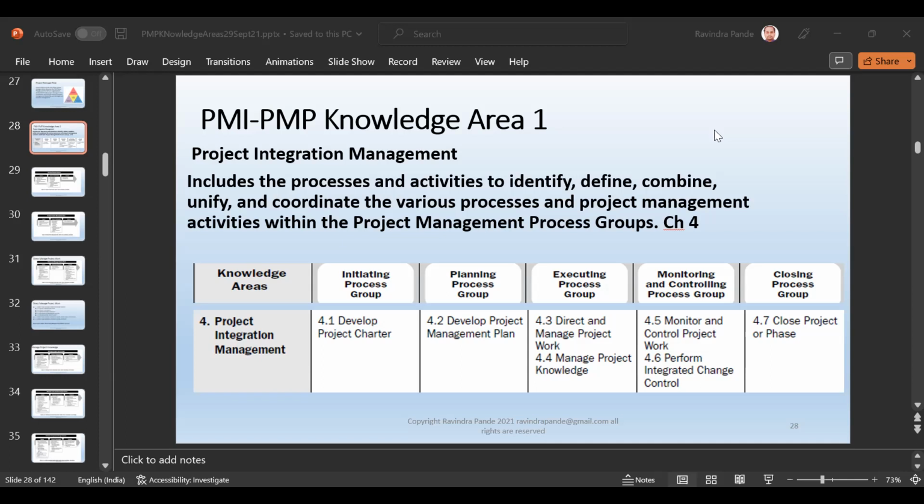So when it comes to develop project charter, in most of the cases, it's a Microsoft Word document. So it's basically text content with some images and everything. Again, develop project charter is normally created after the SRS publication, when you have a concrete size and shape in terms of what needs to be done, what all requirements have been initially accepted and sanctioned by the client, in terms of high level scope, in terms of decision making, various graphs and charts, or various fishbone diagrams, SWOT analysis, and all those things.